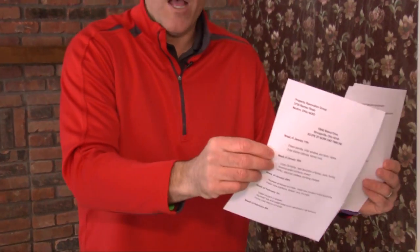Next step is to make sure the house is painted. The whole house, make sure it's painted. Next step is to make sure all your flooring goes in. And once your flooring goes in and then your miscellaneous landscaping is done on the outside, that's step number 6. You're ready for a property launch. So every single schedule should follow that 6-step process.